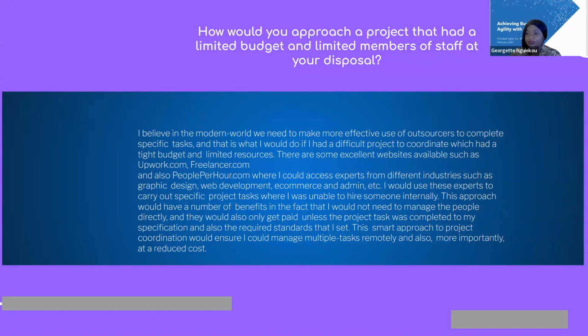What is the must-have feature that needs to be delivered to the client? And what is the best timeline to deliver that must-have feature? And when we agree on the must-have feature, we do the sizing. That means we make sure that, okay, this must-have feature can take 3 sprints, 5 sprints, and we already know roughly what the budget will be for that.